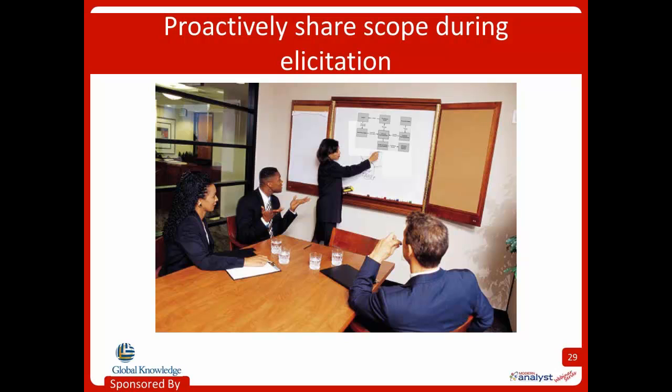So a lot of times we actually will start elicitation meetings by showing our business objectives very quickly. You're not going to spend a lot of time on it, but you're going to say something like, okay, before we do this elicitation topic, let's all remember, here's what we're trying to accomplish. This is why we're doing this project. So then when somebody starts to suggest something that seems a bit outside of scope, then we can bring out the appropriate model and check. Or we can remind them, hey, wait, I don't think that relates to our business objective that we're on. Right? So again, the goal here is everybody knows what's in or out of scope, and they can know it in one quick glance with these different models.